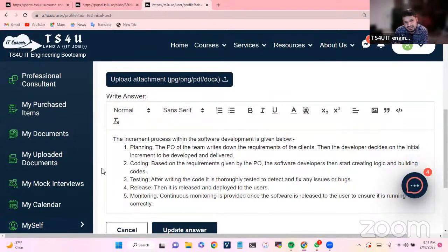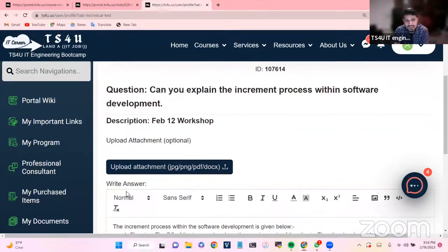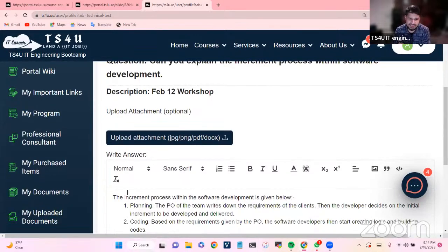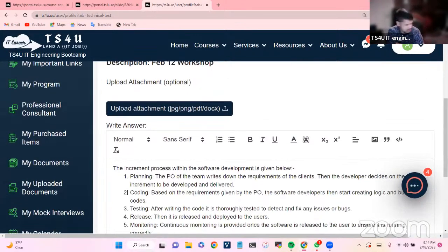That's pretty much it. So a project is 12 months. That 12 months, if it's 2-week sprints, we are going to have 24 sprints. So in each sprint, we are going to make some commitment. The user stories, as a development team, we are going to work on. And then after each sprint, we are going to deliver something. So the sprint planning meeting is actually what you are looking for.